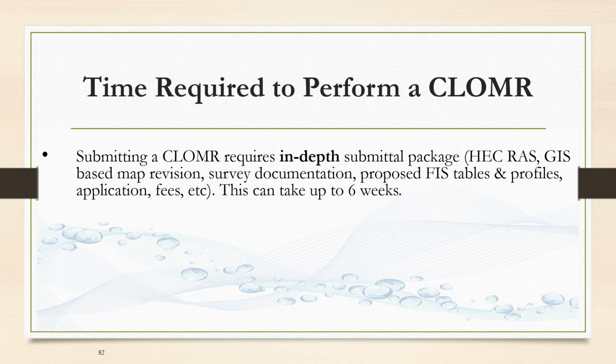Last thing, you're welcome to talk to me or even contact me if you have questions about this. Submitting a CLOMAR requires an in-depth submittal package. It's a HEC-RAS, GIS-based map revisions, your survey documentation, your FIS tables and your profiles, your application, your fees. And this process of putting this mapping, all this package together can take up to about 6 weeks.